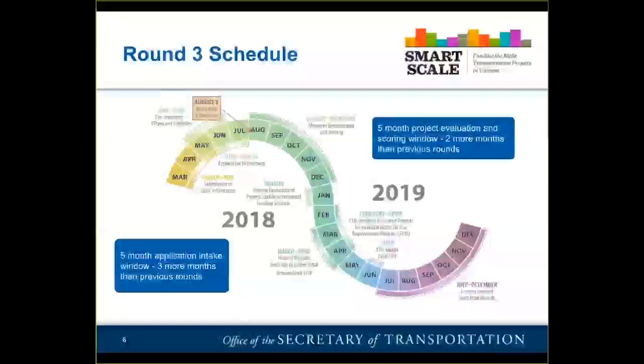And you'll have the option to request that your project be pre-screened. And then the final 2 months, no new applications can be created. You can only refine the applications that you entered and submitted by June 1st. So that last 2 months is really refining, finishing up the application, and then submitting by the August 1st deadline.